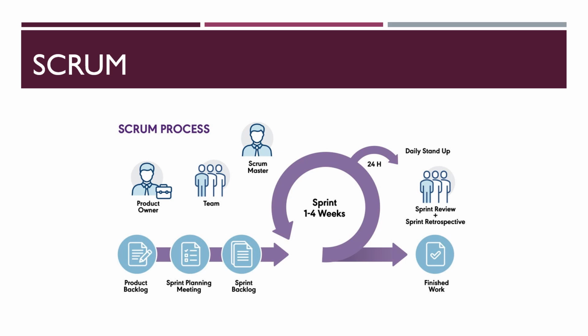After the testing, each sprint is demonstrated to the user, and the last phase is the retrospective. Retrospective is where the team discusses what went well and what can be improved in the next iteration, and the lessons are learned after each sprint. After that, the next sprint is planned and the cycle begins again. This is how the Scrum process works.